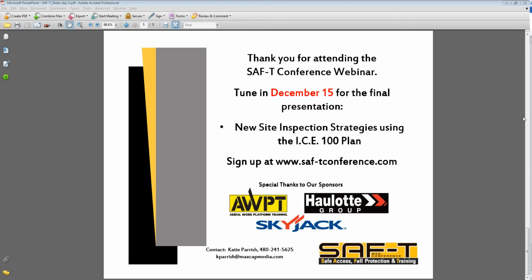Certainly, if you get into some of the very large lifts, you may have special conditions to get them from job site to job site. If you own them, or are renting them for a long period of time and you're planning on doing that, then you will have to understand that and make concessions for it. If you're just renting them from site to site, generally that's the responsibility of your renter to get it to your job site. Okay.